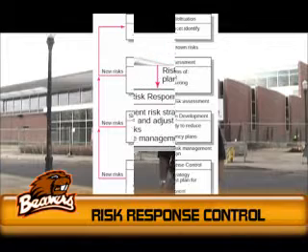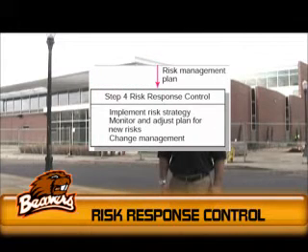Once the appropriate risks have been identified, assessed, and their responses are developed, successful project managers must look to effectively coordinate the fourth and final step of the risk management process, risk response control. During this time, the team must look to implement not only the plans that they have set, but also to respond to any new unforeseen risk that may develop. A change management system is one of the key features of this step, as it focuses on dealing with almost any deviation in the original project scheme.